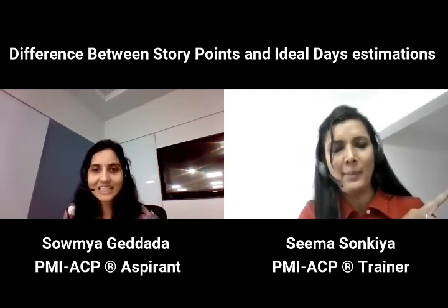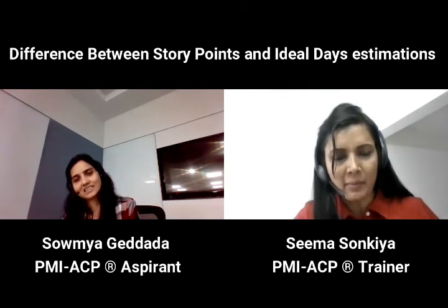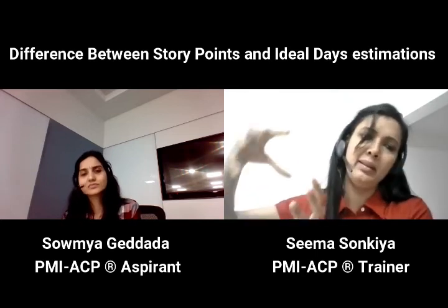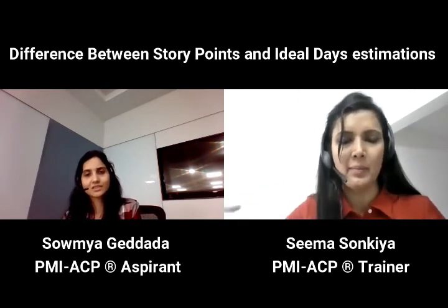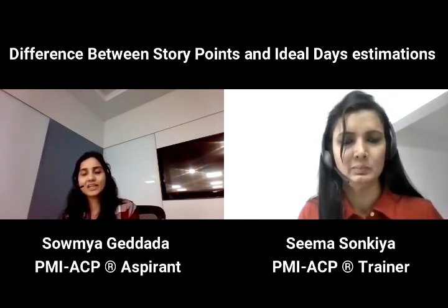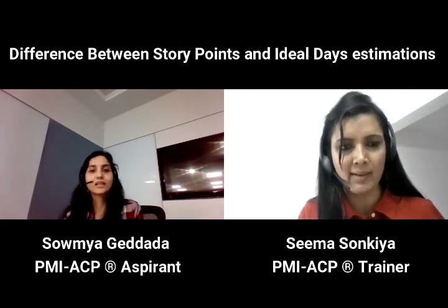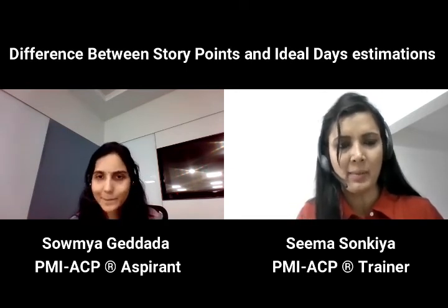And at the product backlog level, we get duration directly from the size. Based on the trend, this work will be delivered in one sprint, and based on that we get the duration, that this product backlog needs this many sprints, with some variable factor. At the iteration level, in the sprint, we estimate for a particular sprint and define the efforts needed for it, because we are decomposing into engineering tasks and assignments are there. So when assignment is there, we can estimate in hours.